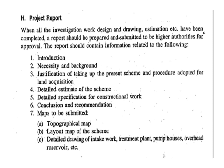When all investigation work, design, drawings, and estimation have been completed, a report should be prepared and submitted to the higher authority for approval. The report should contain: introduction; necessity and background; justification of taking up the present scheme and procedure for land acquisition; the detailed estimate of the scheme; detailed specification for construction; conclusion and recommendation. The maps to be prepared are the topographic map, layout map of schemes, and detailed drawings of intake work, treatment plant, pump houses, overhead reservoirs, etc.